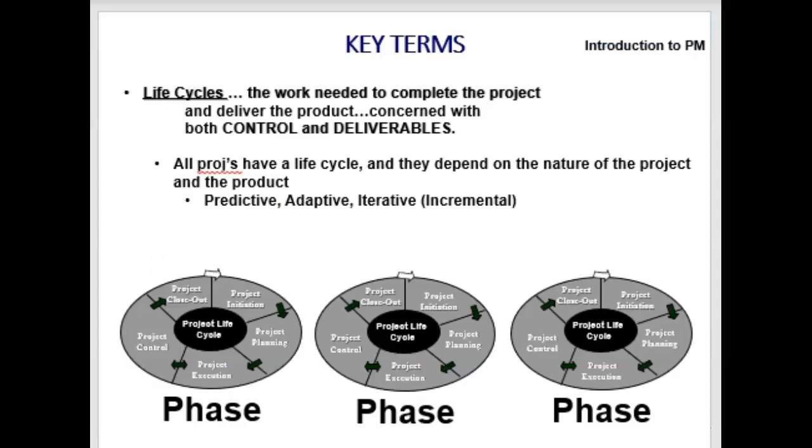So in terms of a go, no-go decision, you have these phases in the life cycle. I just picked 3 phases. You might have only 1 phase in your project of your life cycle. You might have 10, right? Based on your approach. And at the end of each, at the top left where it says project close or phase close in that case, you're going to do a gate, a go, no-go decision, a kill point, a determination.